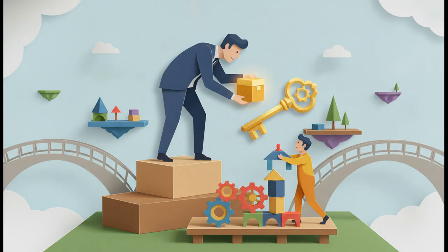Withholding resources, whether that means slashing the budget or pulling your most skilled personnel, is literally the fastest way to kill a project. Top management also speeds up unexpected approvals, and crucially, they have the actual authority to force cooperation between feuding departments across the whole organization.